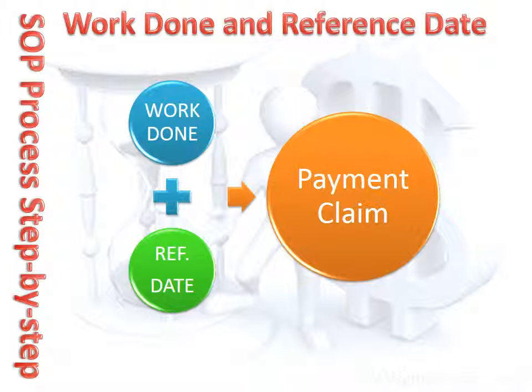Secondly, the reference date has to have occurred. The reference date is the date in the contract or under the Act you can issue an invoice to your client for work done or goods and services supplied. If the contract does not have a date for the issuing of invoices or payment claims, then the reference date is deemed by the Act to be the last day of the month in which the work was done. It is therefore important you clearly have stated in your contract when you can issue invoices, payment claims, and when those invoices or payment claims must be paid.